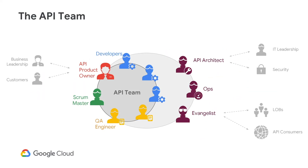A core part of agile is to have one cross-functional API team. This means the API team should be largely self-sufficient with as few dependencies as possible. Here's what the agile API team would look like. The core API team is in the middle, with one team made up of the API product owner, API developers, QA engineers, and scrum master in the inner ring.